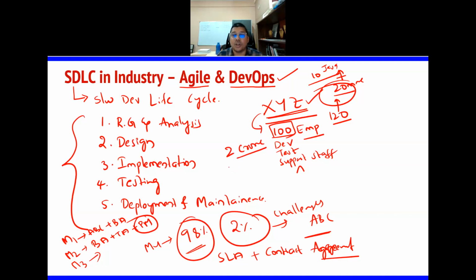Total budget is 2 crore, which you can pay maybe in 3 different phases. And we need at least 13 months to launch the product, and by completing 9 months we will be able to show you the prototype of the website. That way an agreement will be made between the company and the client, that is ABC.